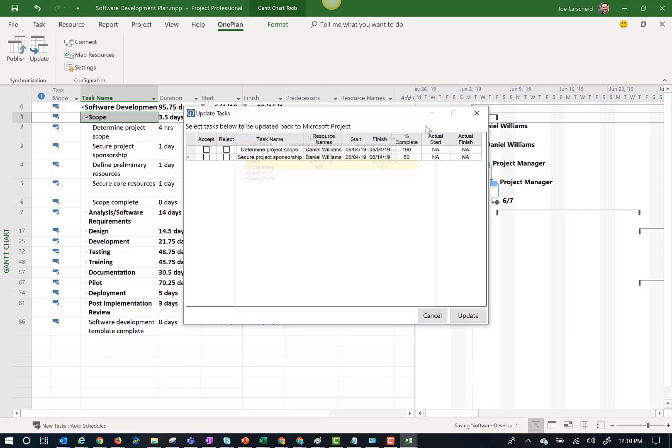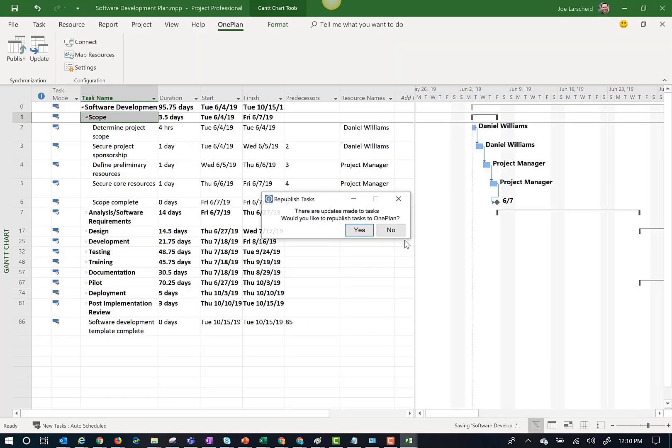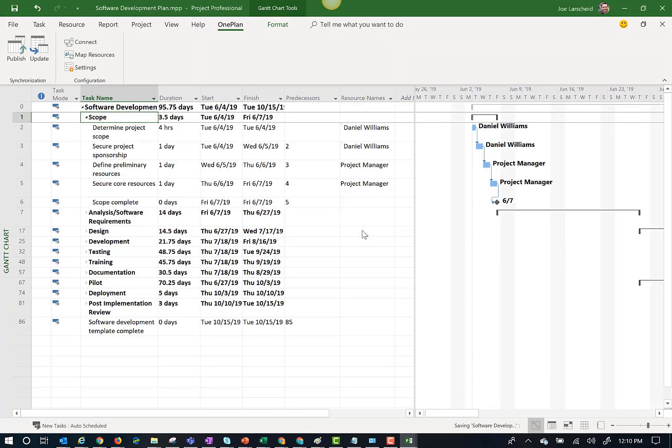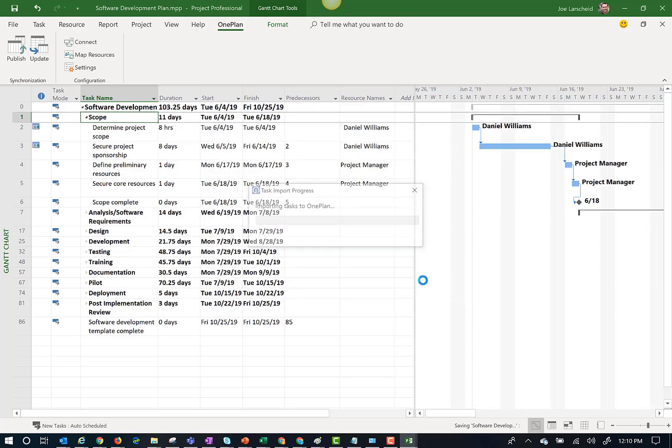Once I have reviewed the updates, I can accept the changes and apply them to my Microsoft Project Plan. Once I have updated my Microsoft Project Plan with the changes, I can publish out the updated Microsoft Project Plan to OnePlan.